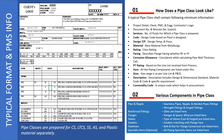First, there will be client name, PMC name, and engineering contractor name, along with a few logos. Then document number and revision — this is very important, as these documents may get changed during the course of the project lifecycle, so the revision and date will change accordingly. The top information along with revision and date may appear at the top or bottom, but it will always be present. If a particular pipe class is revised, only that pipe class information will be updated.